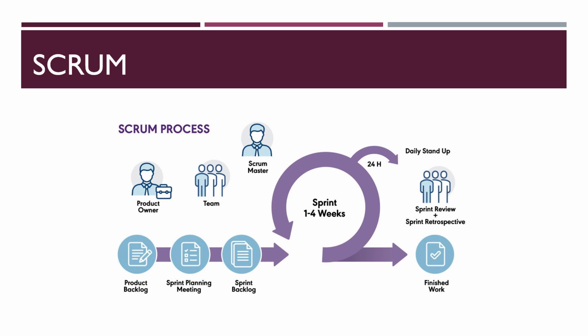Next comes sprint planning and creating a sprint backlog. First, the Scrum team selects the most important user stories and breaks them into the smallest tasks possible, where the average sprint only lasts for 2 weeks. Here, sprint means iteration, and throughout the sprint, daily meetings are held. These daily meetings last up to 15 minutes, and the aim of the daily stand-up meeting is to gather the status of each team member. The full life cycle test is carried out here.